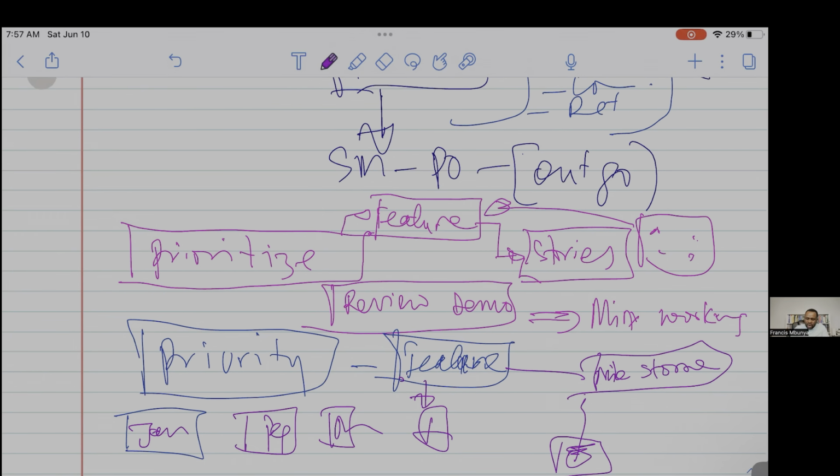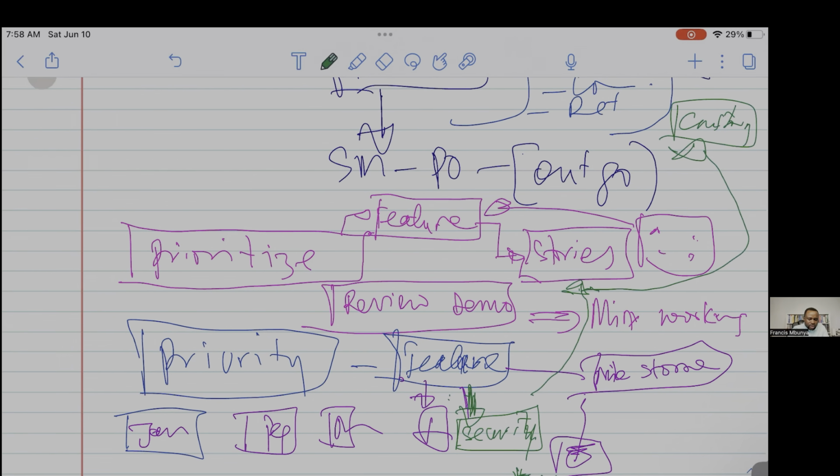Now, when this is done, what happens? This is why backlog prioritization is very important, because things might change. You might target these, and while the development team is working on this feature, the development team realizes that, hey, for us to do this, we need security permission from the database in the state, because this needs to meet with XXY law. Now, this is something that wasn't previewed. Because this wasn't previewed, this can affect the delivery date. So in this case, this needs to be communicated directly to the product manager. The product manager needs to go and discuss with the customer. And if this is something they cannot do without, they will need to do what? Come here and adjust the scope, right? And adjust the scope, because there's a major requirement.